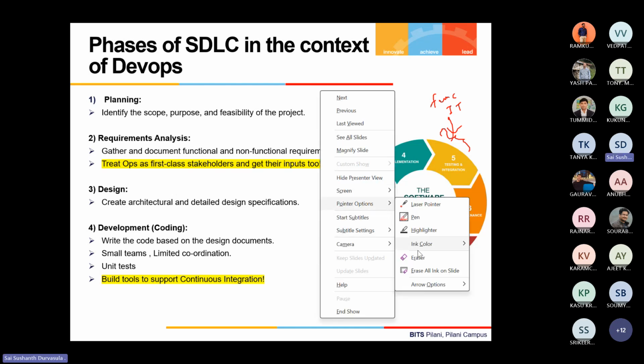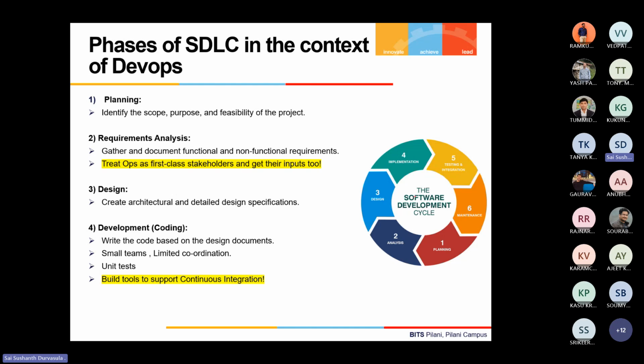Right. So let's proceed further. This is the SDLC, and like we discussed, during the requirements phase, while product teams are involved in understanding the business requirements and how to convert them to technical requirements, DevOps needs to start planning what kind of infrastructure to provide for various environments like dev, test, staging, prod, etc., and the tooling needed for each of these tasks, to plan for automating these and establish the pipeline.